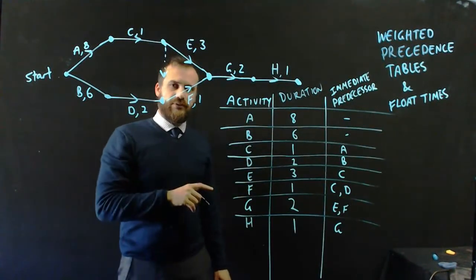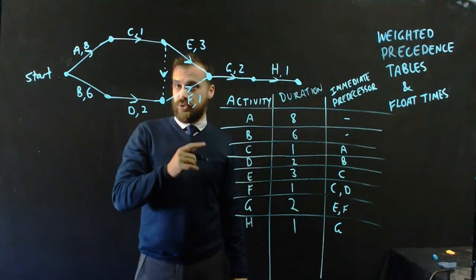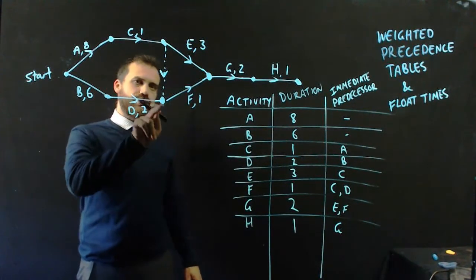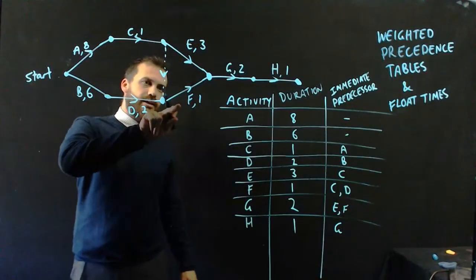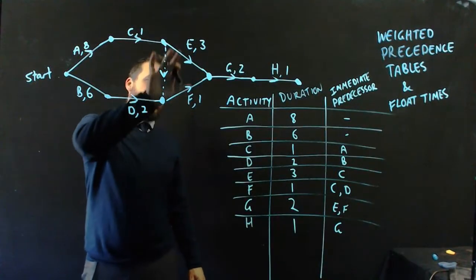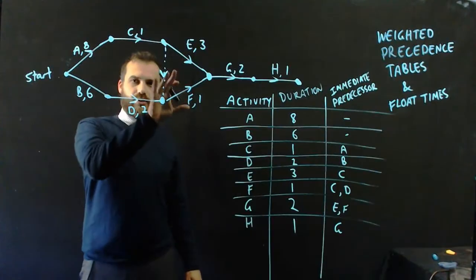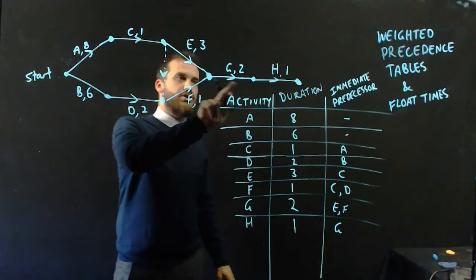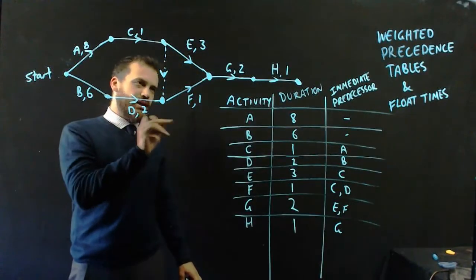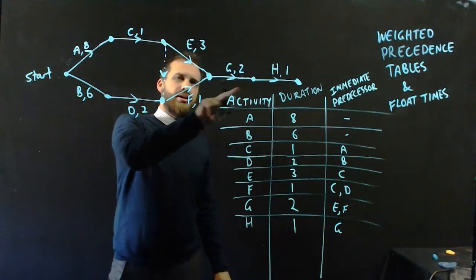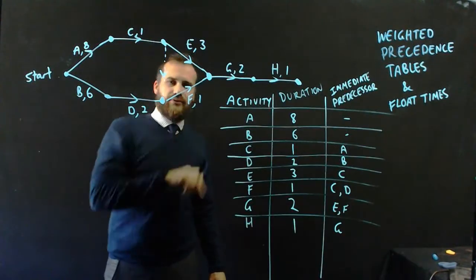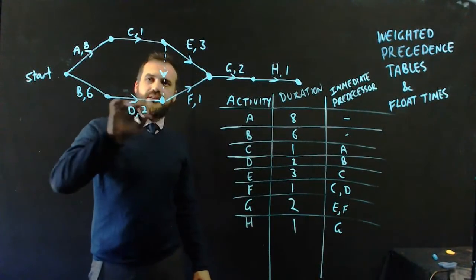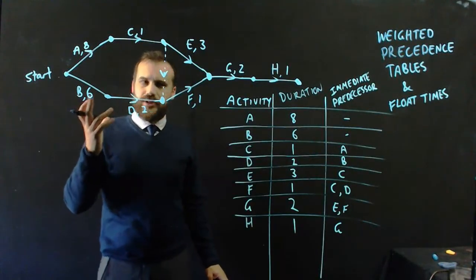Now, I promised you we'd also talk about float times, so let's talk about float times. Now, to talk about float times, I'm going to draw your attention to this part here. E and F are the important things that I want to talk about. Now, E and F are predecessors to G, right? So that means that I can't start doing G until E and F are complete. Now, I can't start doing E and F until D and C are complete, right?